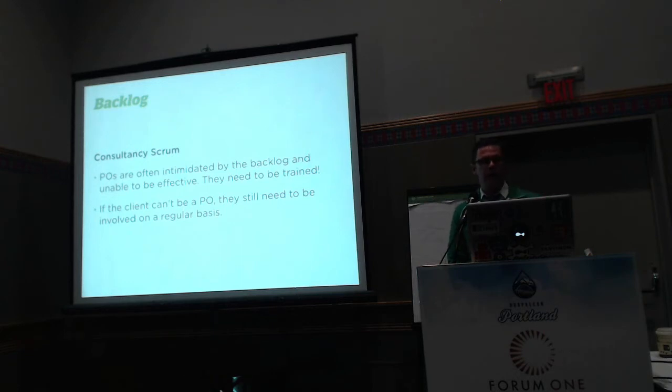If the client can't be the PO, they need to be involved with the backlog on a regular basis. So as far as training, you want to make sure that they understand what stories are. That it's, as a role, I need to do something so that business value is provided. As a blank, I need to blank so that blank. That is a user story. They need to know how to write them. They need to know exactly what the backlog is. They need to know what prioritization means.